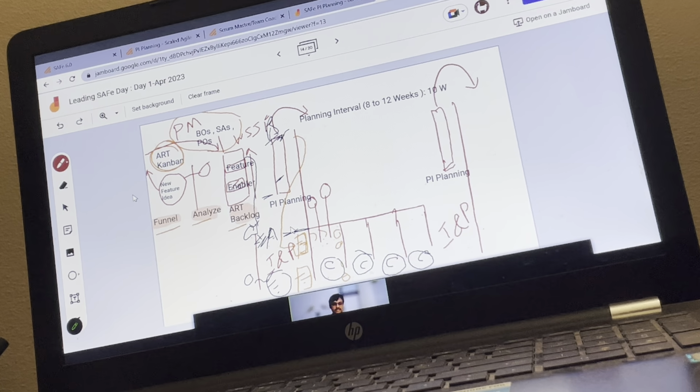We will look into the slides as well. Now, as we learned, the product owner might be adding new stories, reprioritizing these stories, or adding refinement or acceptance criteria to the user stories in the team backlog. Those also need to be discussed. So the product owner should discuss it with product management and other POs. They come together maybe weekly to talk about what kind of adjustments they have made in their area. They can also have a subject matter expert and system architect. I'm just showing them as key participants of these particular meetings.